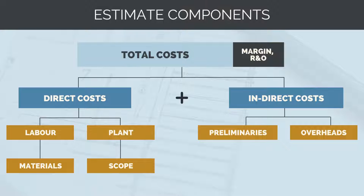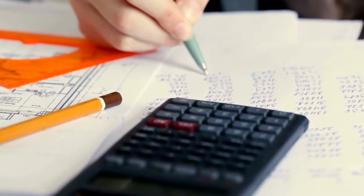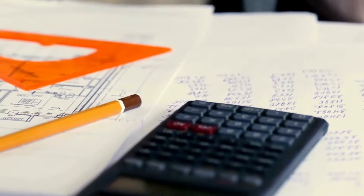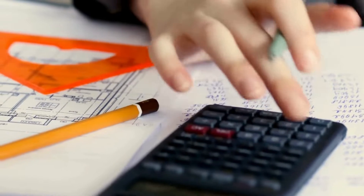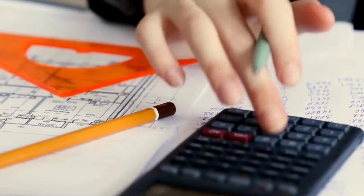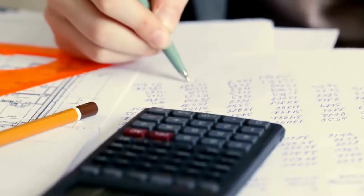To our total project costs, we need to factor in some contingency, referred to as our risk and opportunity, which accounts for any uncertainties in our pricing. And finally, we can then add our profit margin. Now we understand the components of a cost estimate, it will be easier to understand the steps we need to follow to produce an estimate.